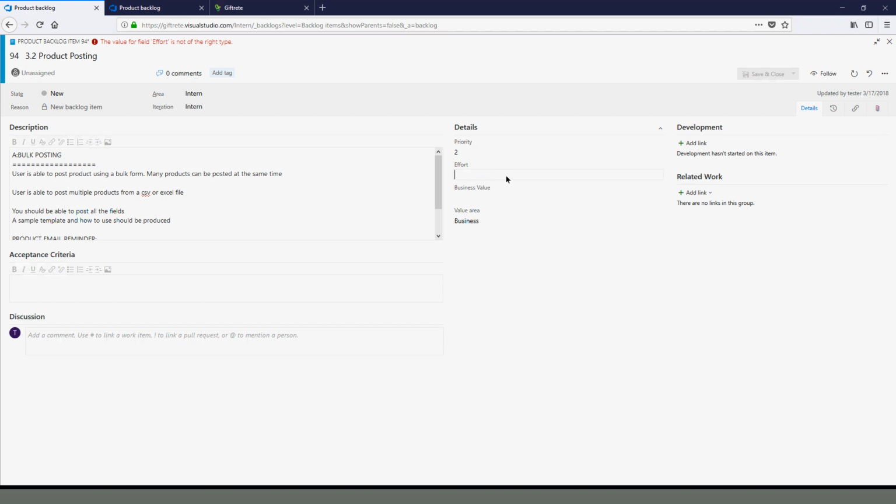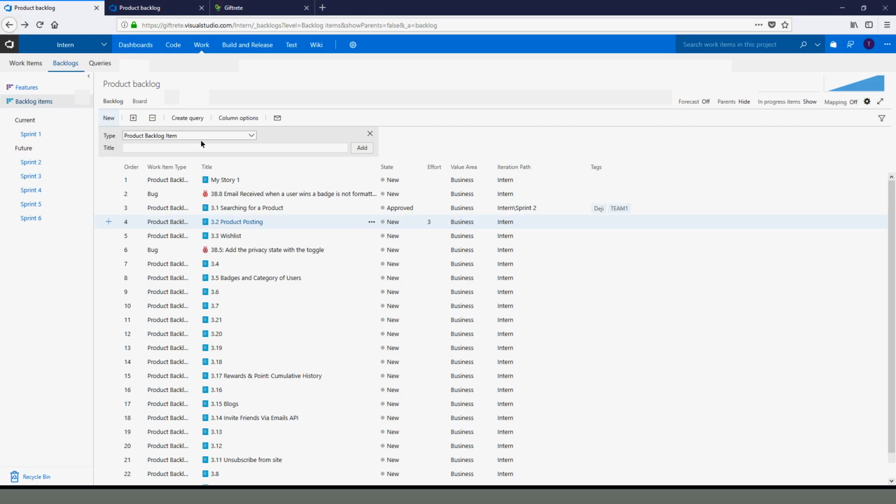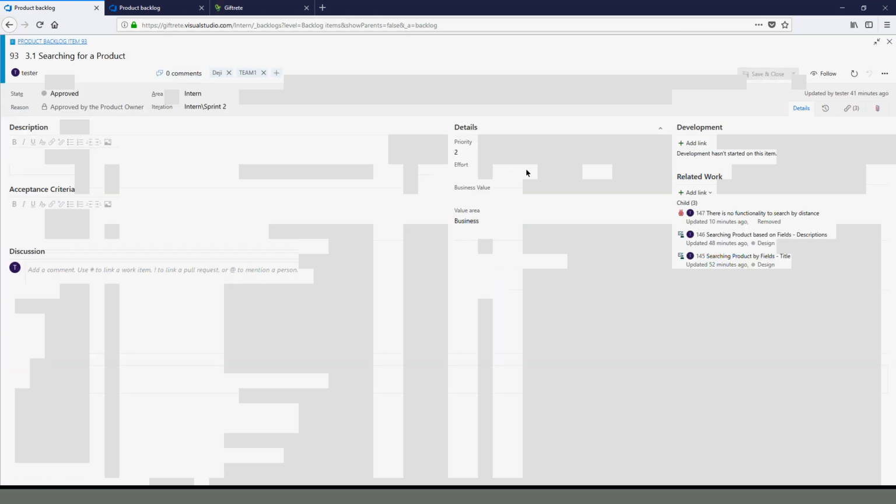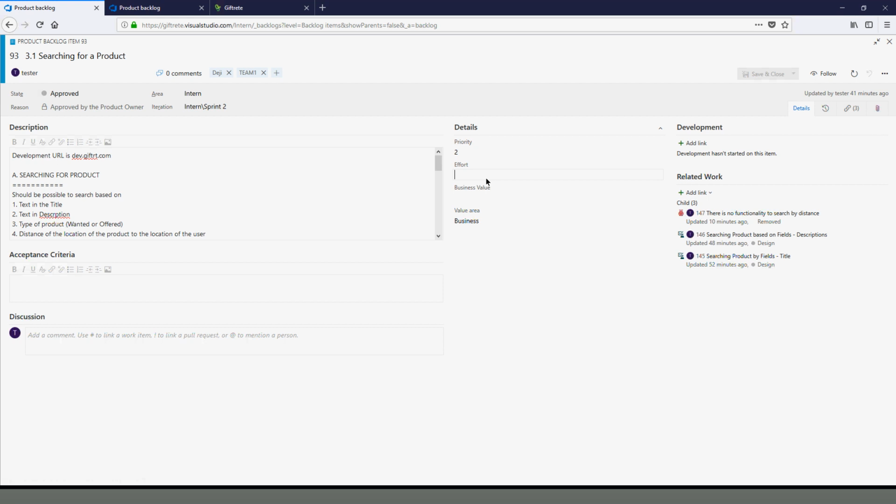And I've seen some people use, okay, if it's a big one, you put maybe 3 points, and you save that. That is 3. So 3 could be the medium part. And the one that we are talking about, which is the biggest one, we can say, oh, that should be 5 points. So that's you trying to see, okay, what are the efforts and how big is each of the stories. So when you are assigning the story, you know that, oh, I took 5 points.